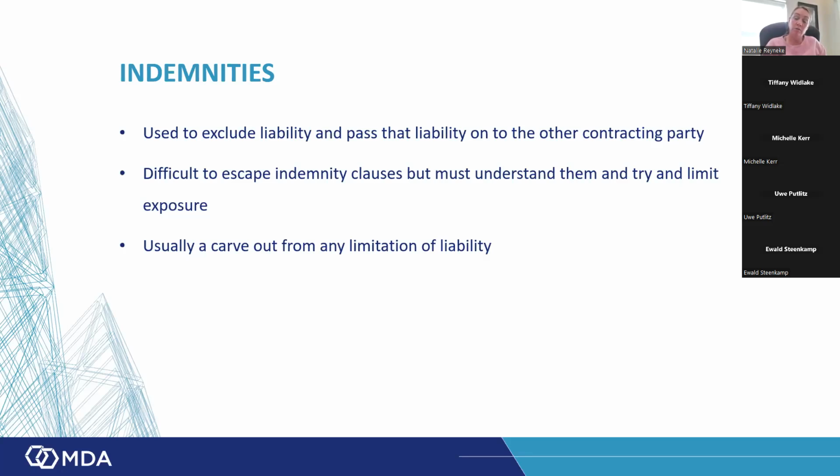So then I need to make sure as the contractor that I have sufficient third-party insurance to cover any of those losses. Another one that we come across is the contractor indemnifies the employer against any loss or damage due to a breach of the law. That's also something to say, well, look, as the contractor, can I expect the employer to take responsibility or risk in my breaches of the law? Probably not. Okay, I'm willing to accept. So if anything happens or anyone claims against the employer because of my breach of the legislation, I'm going to step in and take that responsibility.